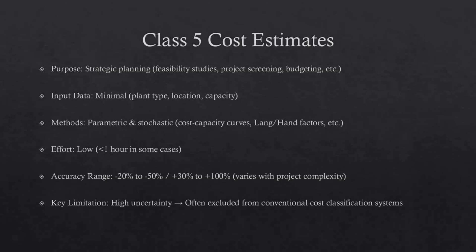Typical accuracy ranges for Class 5 estimates are minus 20% to minus 50% on the low side and plus 30% to plus 100% on the high side, depending on the technological complexity of the project, appropriate reference information, and the inclusion of an appropriate contingency determination. Ranges could exceed those shown in unusual circumstances.